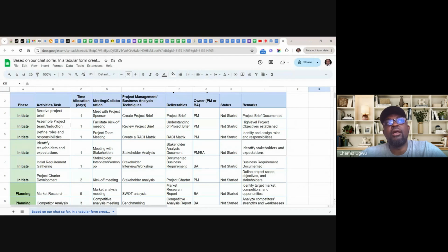In a project breakdown structure, you can see that I've broken this project down into 4 stages. And in each stage, I've captured some tasks. That is what a project breakdown structure is. You break things down into stages and keep breaking them down into substages. It's just like categories and subcategories.